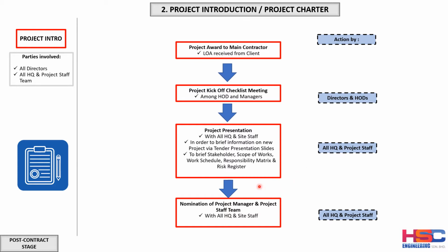Okay, and during this project charter meeting, this presentation meeting also, the sponsor of the project, which of course is the director, the managing director, or the head of the department of the company, or the senior management of the company, will nominate the project manager and the project staff team. During this time, the project organization chart will be presented.